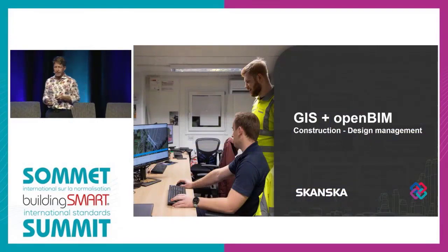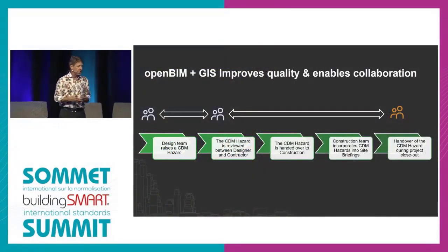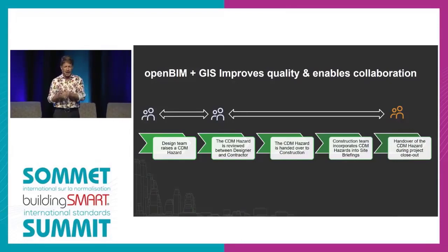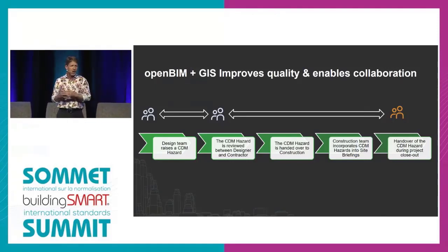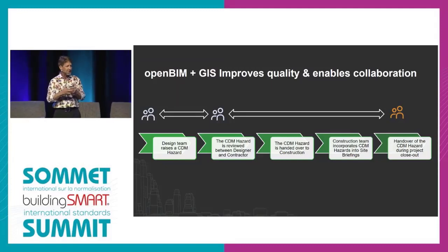So for construction design management, this is really interesting, I think. They perform a process of construction design management whereby they're collecting existing conditions, reporting on potential risks, potential issues that didn't come out in the initial design documents, so that as they start construction and work through this process of understanding the site, construction can occur most effectively.